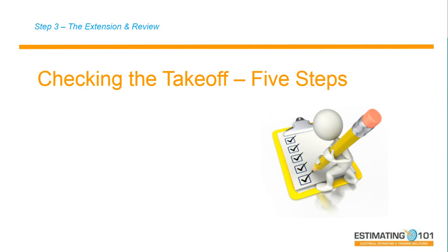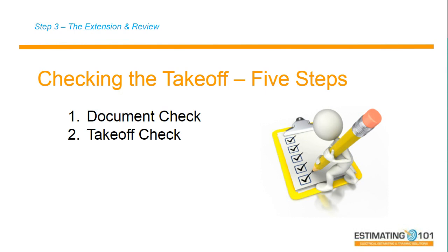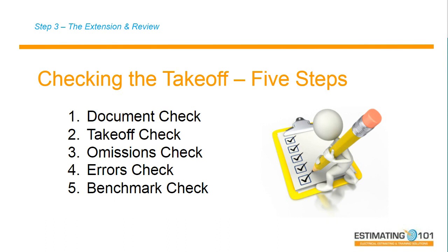I have a 5-step process that I go through in checking my estimate. The first thing is I do a document check. I do the takeoff check. I look for omissions. I look for errors. And then I have what I call a benchmark check.